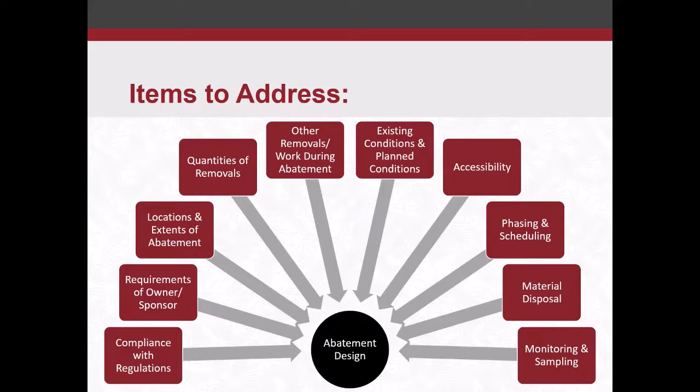In your design, you want to be careful to mention where you might have elevated areas where the contractor would have to bring in specialized equipment to access those, or confined space type entry. You could just imagine a demo project. Just straight up demolition, just trying to get access to certain things is a chore or challenge